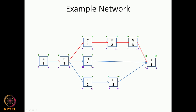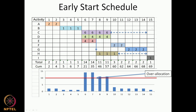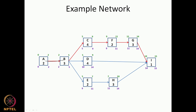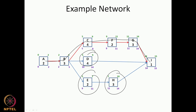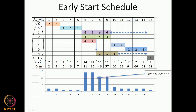We have this network we had considered in the last example and we had worked this out for the overallocation problem. We had the activities A to I here, and the critical path was A-B-C-F-G-I. Activities D, E, and H had float, and we were going to try to use the floats of these activities. In the earlier exercise, we used those floats to resolve the overallocation problem. Activity D has float, activity E has float, and activity H has float.